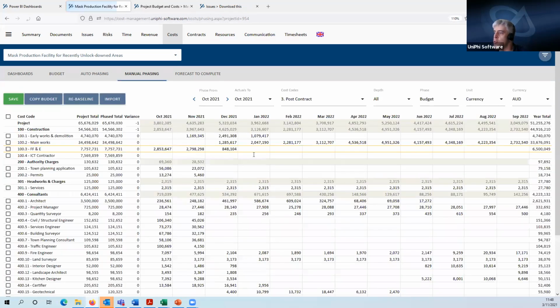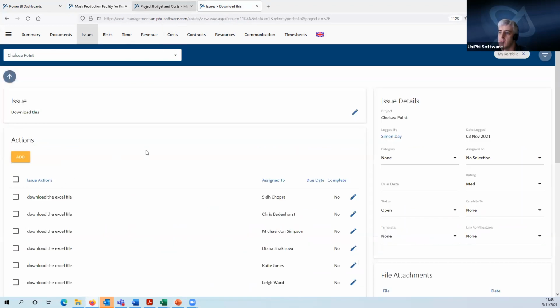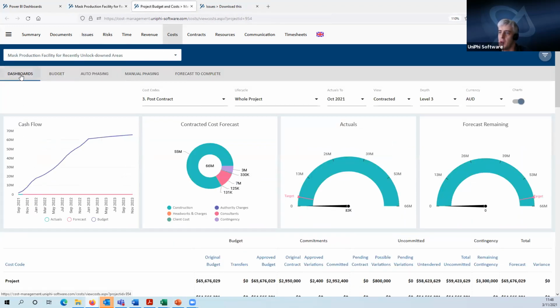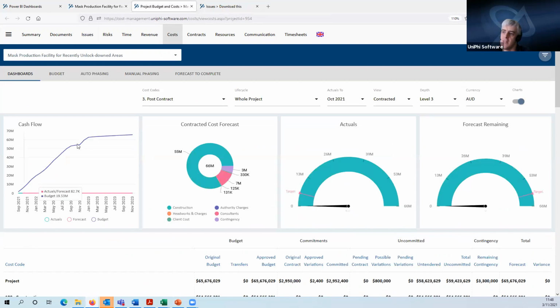And that will have now recut those S-curves to match those other projects. So that's what it was before. If I just refresh this, whoop, you'll see that's changed shape. Which is interesting. There's obviously something in the data of those other projects that means there's a slow in spending around this time, and then it picks up again. I don't know what that is, but that's what the data says from the other projects.